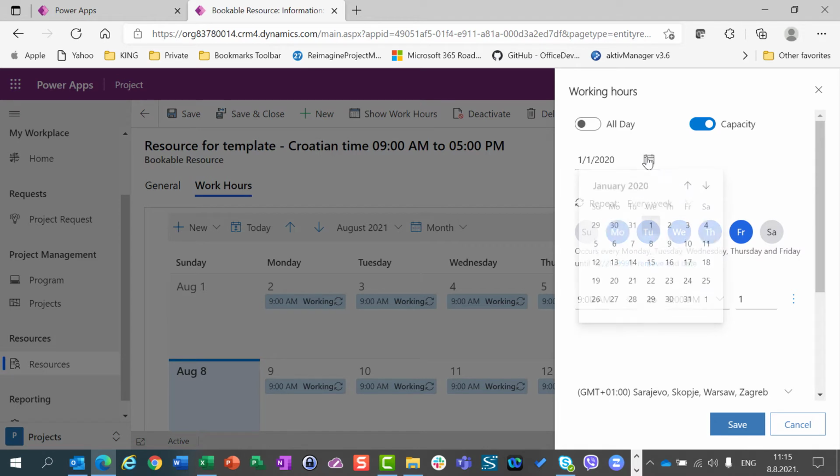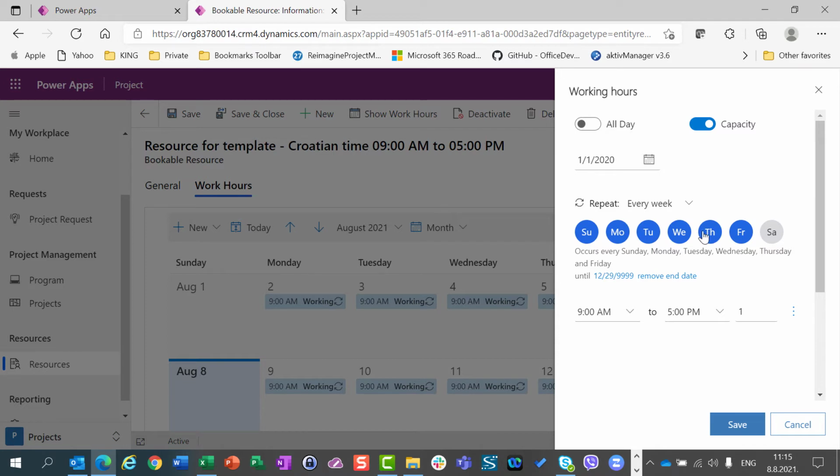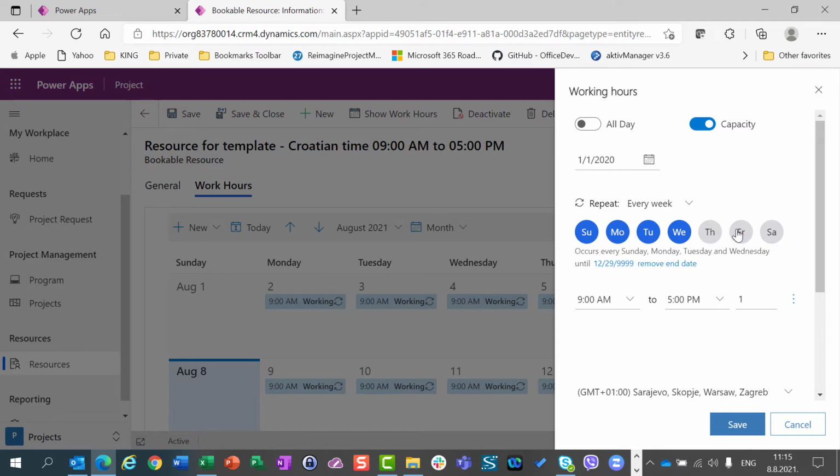I will click that this start with particular 1st of January of 2020. I can choose days, working or non-working days. So I will say, okay, Monday, Tuesday, Wednesday, Thursday, Friday. Okay. I will choose from 9 a.m. to 5 p.m. Sorry.